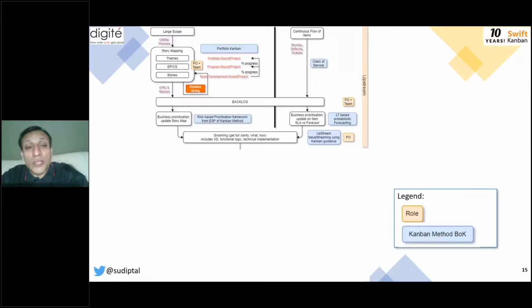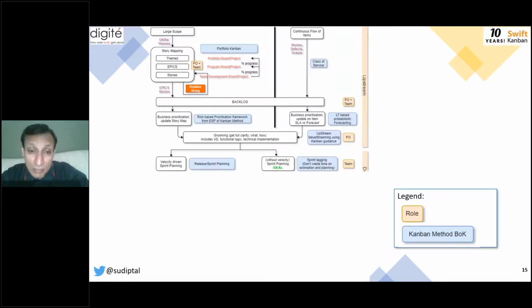The problem is when the grooming is weak, and you get into a lot of questions back and forth, you get into blockers, you get into verification questions back with the business saying, I don't know what happens if you do this scenario, and that then slows down the entire downstream pipeline. So, strong best practice guideline: focus on grooming it right and grooming it complete, define your acceptance criteria, make sure there are no open-ended questions. If required, get some of the technical people to help you with the grooming process, so that once the downstream team picks up the card, it can go zip, zap, zoom. Absolutely.